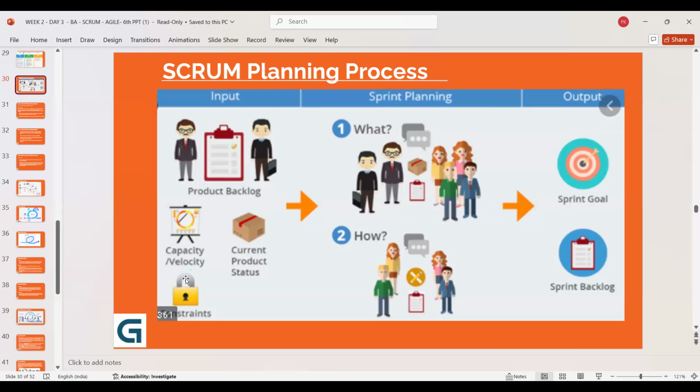That means all the members who are going to provide input in this meeting, that is sprint planning, as we just learned, everybody will come in and share what their responsibilities are. The Scrum Master is the facilitator. The product owner will share about his priorities, and the development team will share about their readiness. This is how we do it.